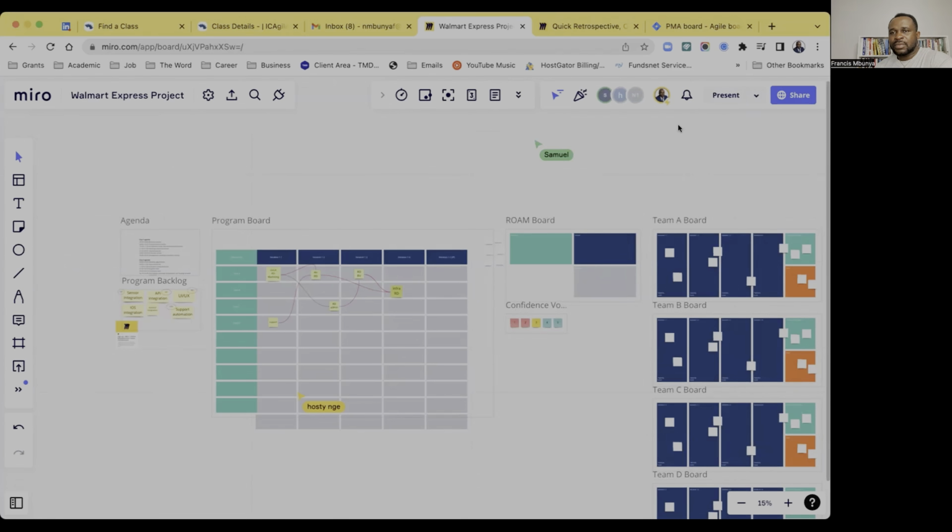And I'm asking myself, this thing has been lying here for 4 different weeks, and you guys didn't schedule a meeting. We've made our capacity planning, we've made provision to pick this thing and start working on it. We've worked, and today we have 3 days to the end of the sprint. And this evening they came and were bringing up change in a defect. But in this case, like Doc says, you have to protect your team. I'm standing my ground. We are going to deliver what we committed to at the start of the sprint. We are not taking any additional requirement. If there's anything so pressing, then they have to bring it up in the next sprint.